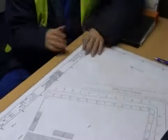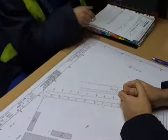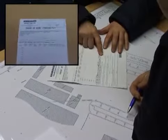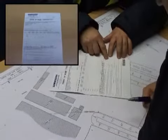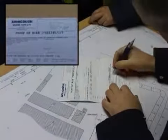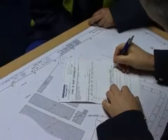That's great, okay. Is there anything that you've got for me that I need to sign on and do? Yeah. It's the group hire sheet, which basically you need the name of the appointed person in charge of the lift operation, yourself, and then just to sign each one saying that we've both viewed and understood the method statement and that our work will be carried out in accordance with that method statement. Okay. And there we just sign and you sign again there. Okay. Sign that. This requirement applies to Construction Plant Association model conditions for crane hire only.